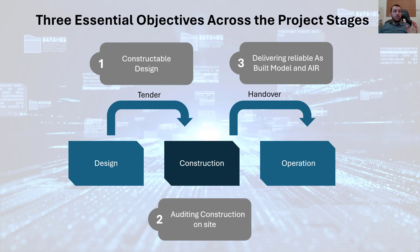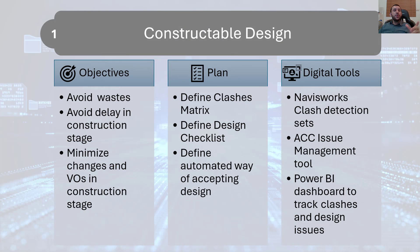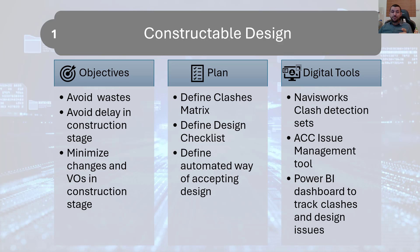Let's start with the first objective: constructible design. The goals are to avoid waste, avoid delays in the construction stage, and minimize variation orders. The plan is to minimize design issues and make the design more reliable: define clash matrices, define design checklists, and define an automated way of accepting design. The digital tools we chose are: set up Navisworks clash detection sets to match our matrix, implement the issue management tool in ACC or Autodesk Construction Cloud, and use a Power BI dashboard to track clashes and design issues.